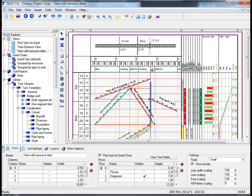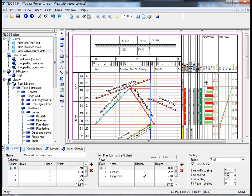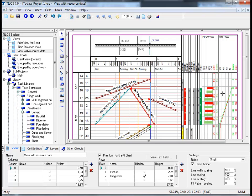I will just move my mouse over to show you the area I am referring to. The first chart shows the usage of selected resources in the project, and each separate color stands for an allocation, as this enables the display of numerous resources in a cramped and limited space environment. Moving on to the second diagram, it highlights the cost per week in red. The income is colored green. The third diagram on my far right-hand side shows the sum of total values, and this diagram can also be changed to show the difference between cost and income.